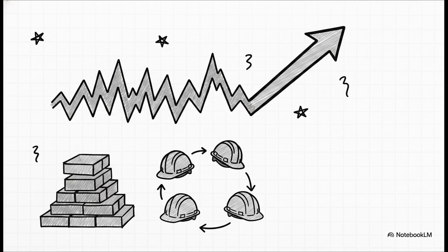And honestly, the most impressive part? Implementing this has been shown to improve overall plan reliability, what we measure as percent plan complete, from a chaotic 65% to a highly stable 85% or more. That is a massive leap in performance.